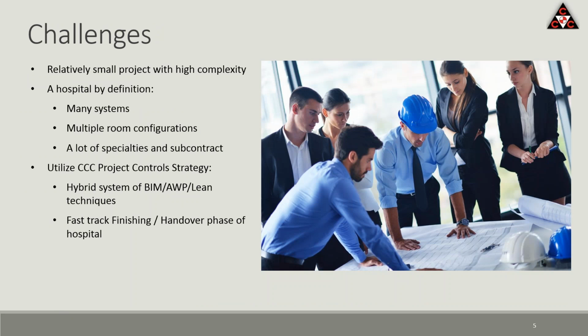So the challenge is this project was a small project, relatively, but highly complex. Many systems, multiple room configurations: you have patient rooms, you have x-ray rooms, you have so many types of rooms, a lot of specialties and subcontractors. And we wanted to use CCC project control, and we decided to concentrate on the room finishes because that's the most complex part of the structure.